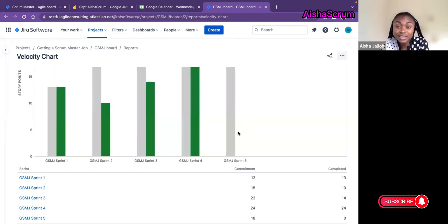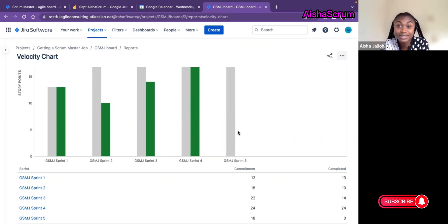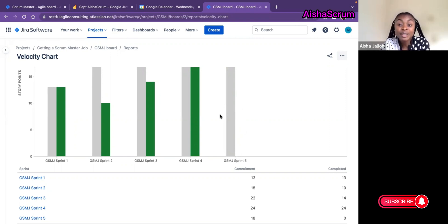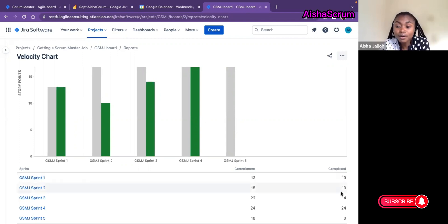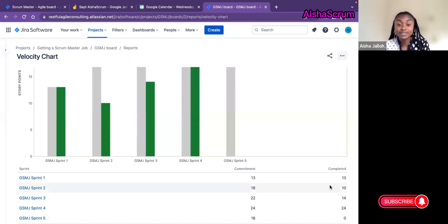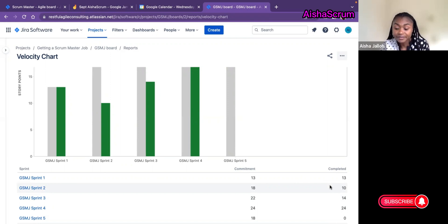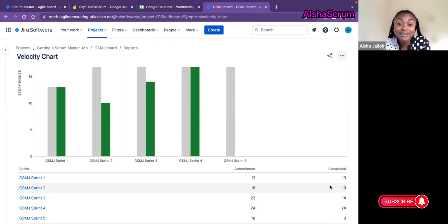We are dividing by five because although the team did not complete anything in this sprint, it still shows that at the beginning of the sprint they had the confidence that they would get this work to done, but for some reason something happened. There might be a lot of other factors that affected why this team was unable to complete anything in this sprint. So to get my true team average velocity, I am adding all of this completed number—basically I'm adding 13, 10, 14, 24. I'm adding all of this number to get the team's average velocity, and I divide it by 5. So when I divide it by 5, this team average velocity is 12.